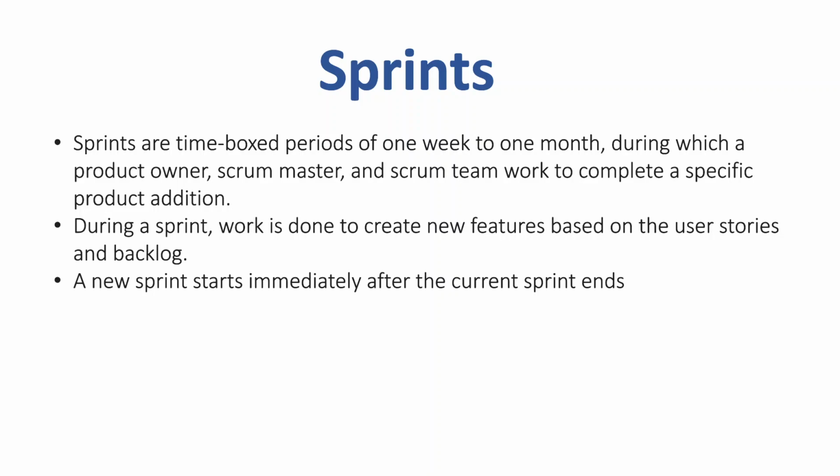What you actually do within a sprint is, as a team, you work towards a sprint goal. For example, say you are trying to build a product and you are working for multiple iterations and you are trying to build an MVP, that is a minimal viable product. So sprints are a smaller time boxed event. You will have a set of tasks or user stories which you will try to achieve within a specific time event. It may be 1 week, 2 weeks, or 1 month, depending upon the team you are working on.